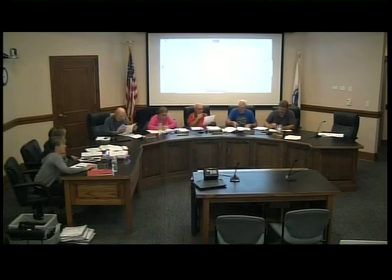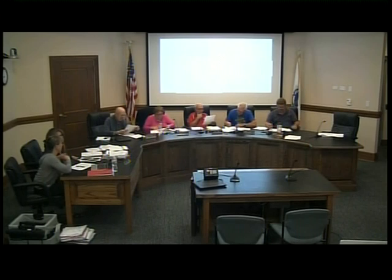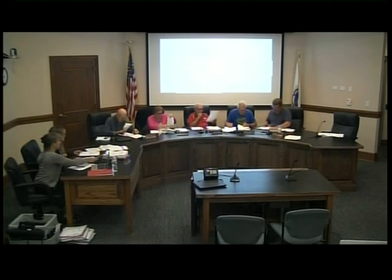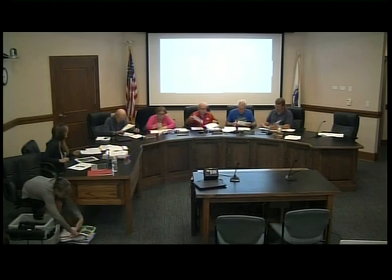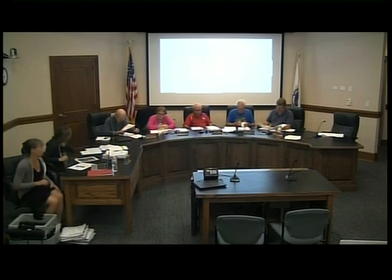First order of business is 242-628, PCOC request for 58 Meadowwood. So 58 Meadowwood is a request for a PCOC. We had them do an as-built plan when they contacted us, and this is it. So the deck on the back was not on the original proposed plan, but none of the appurtenant structures for this development were on the proposed plan. It is on the wall, so you can see the rock wall there, and the deck hangs over, but the footings are on top of the wall. So no footings actually go on the other side of it. Other than that, everything is as built. Obviously, it's within the buffer zone. We recommend issuing the PCOC. Joe, any questions?